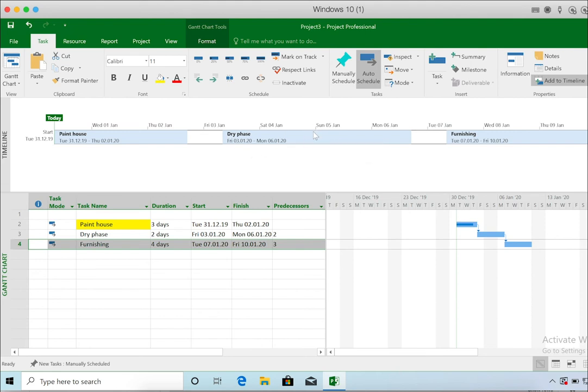So now this is a view which you can easily print out. You can put it in a PowerPoint, and you can choose which activities should be shown and which ones to skip. Because if you put every task into your timeline overview, it becomes just overwhelming and too complex. But sometimes you just want to report the status on a few key tasks and skip the rest because they are not that important.